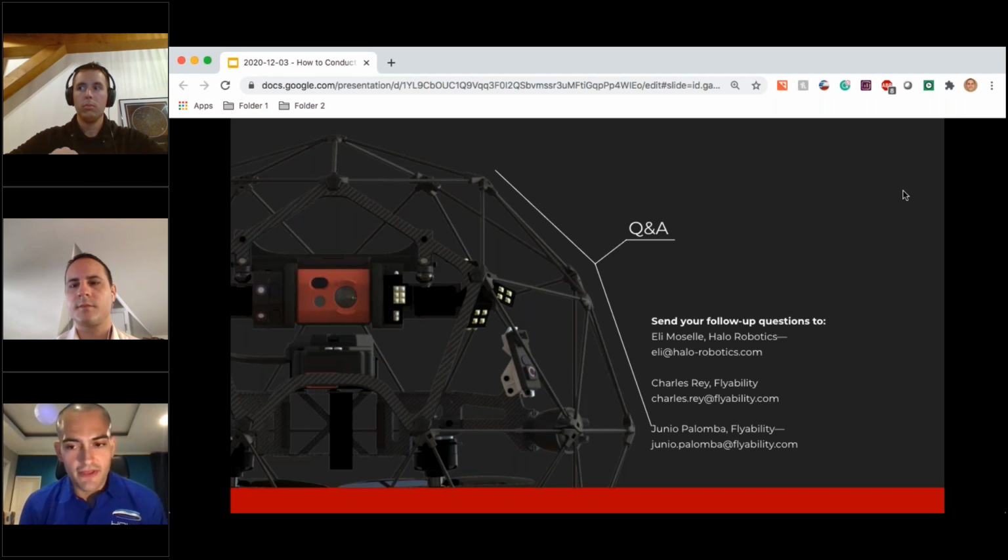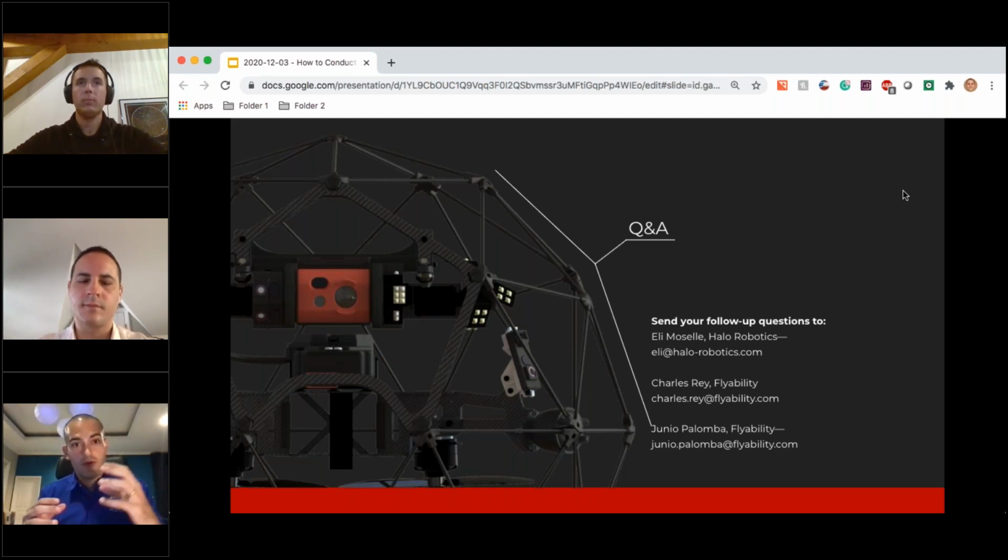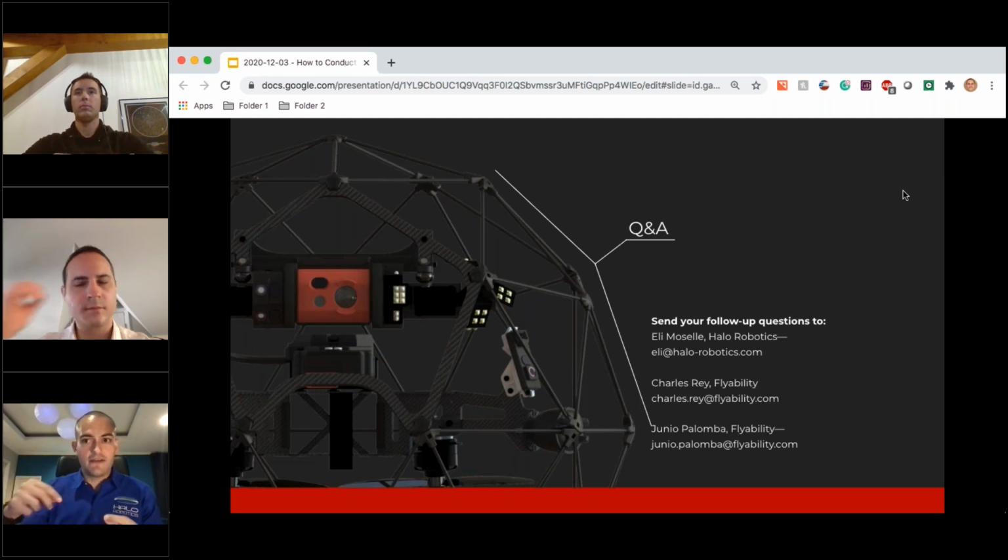There are cases like that. I think that Charles will also be familiar with underground mines. One thing to note is that the fishing line also does create its own risks, because the drone can get caught on the line, and you'll have a line that's in the asset. So it is also something to consider whether it is feasible.